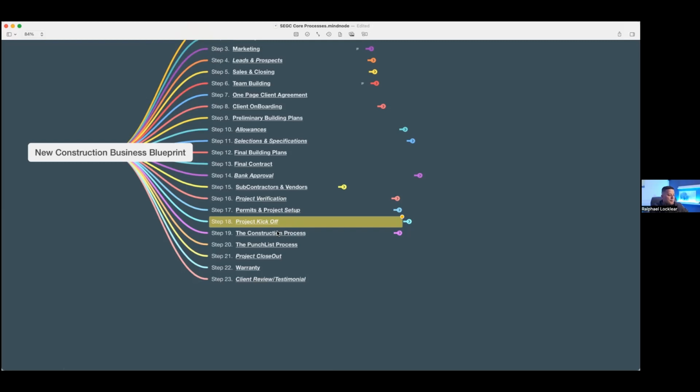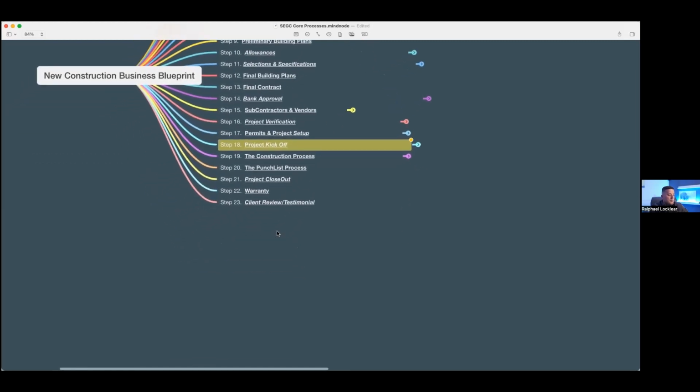Got one more question. Owen asked, who submits the request for the permits, the customer or the general contractor? Normally, when we do it, it's us, the general contractor. We always let the clients know that if they're going to pay us, we do everything. We make it streamlined. We want to control the process, control the outcomes. But some people do it differently, and yes, sometimes homeowners can do that also. It all depends on what you negotiate.